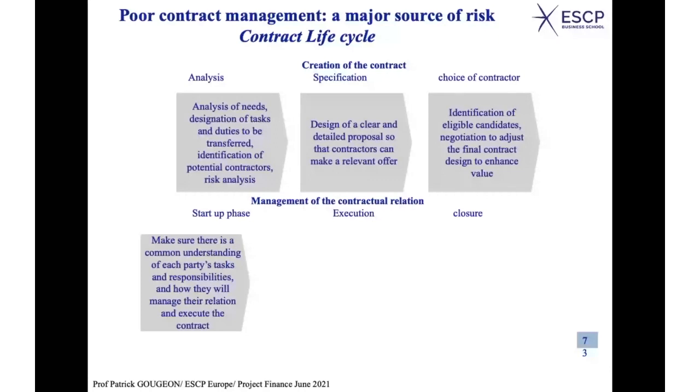And to make sure that the people are prepared to work together and agree on what each party has to do, okay? What are the responsibilities of each party, okay? And if some kind of mismatch is identified in this very early phase, well, you have to ring the bell and say, well, there is a problem there, maybe we need to adapt something, okay?